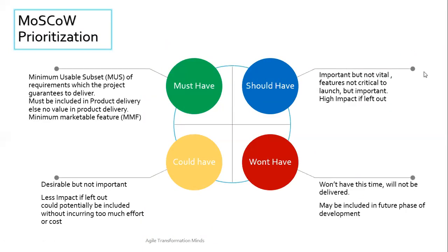Now, the very commonly used one, the MoSCoW model. You must all know this, and you can expect some questions in PMI ACP on this. The MoSCoW model is how you prioritize your product backlog. For example, if your product backlog has 20 features, how do you make sure which is the highest priority and which is the lowest priority? There are different methods like Monopoly and the 100-point method, where you work with your client to understand which features are must-have. It is called the minimum usable set.